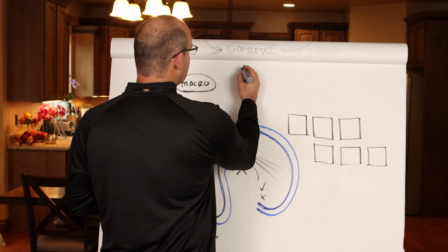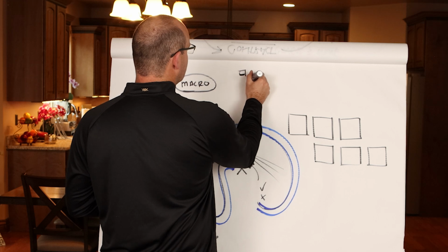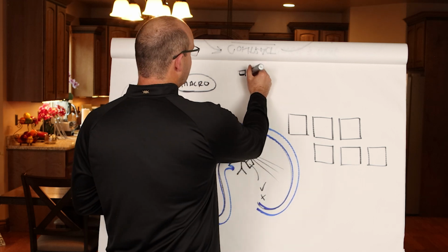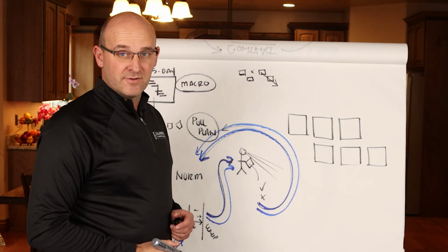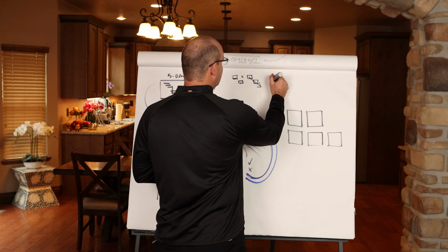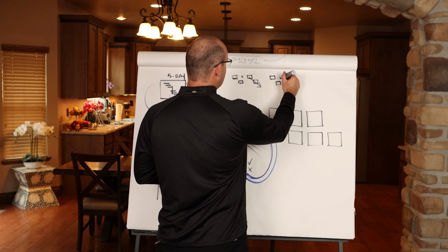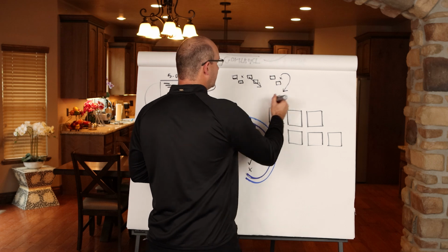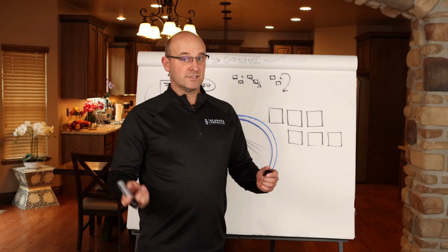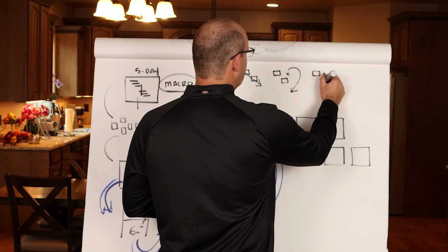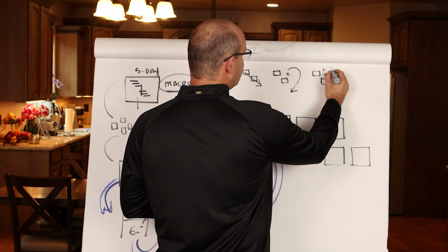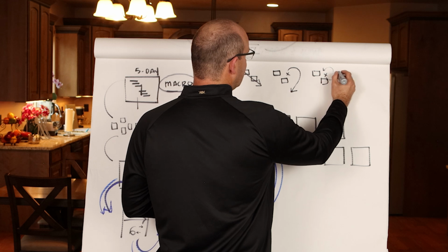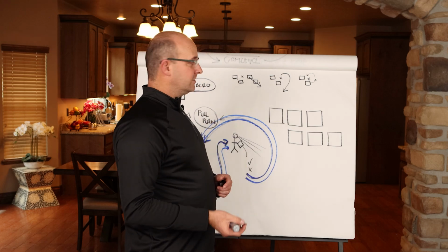But if you have a delay in an activity, and this is the delay, you can cascade that delay and eat into a buffer. Okay, that's one thing. Let's say that you have a Takt plan and there's a delay and you're now going to delay subsequent work. Well, this work can be pulled out and detached so that it doesn't affect other work. If you have a delay and this delays the activity, sometimes you can move an activity that is ready in the place of the delay and actually switch that out and change the sequence.